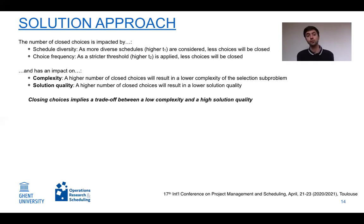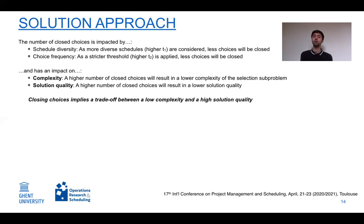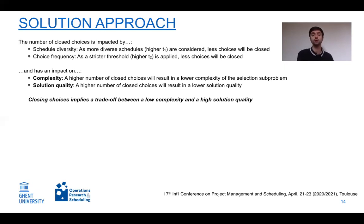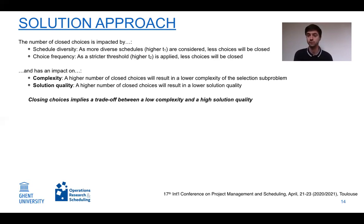The number of closed choices impacts, first, the complexity of the selection subproblem — the objective of our research. Closing more choices lowers complexity by fixing more alternatives. However, it also affects solution quality: a higher number of closed choices reduces the search space and can lower the final solution quality.